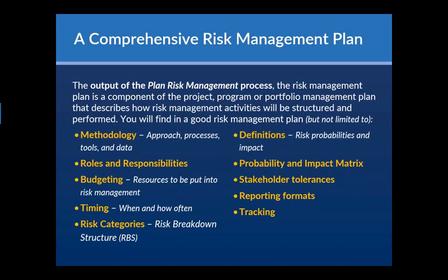hey, what are we doing for this project? So methodology wise, what approach, how are we using the framework? What are we doing, not doing? What tools are we using? How are we going to deal with data? Roles and responsibility for risk. So it's not like the roles and responsibility or the RACI chart that you would find for your entire project, it is specifically towards who's dealing with risk.